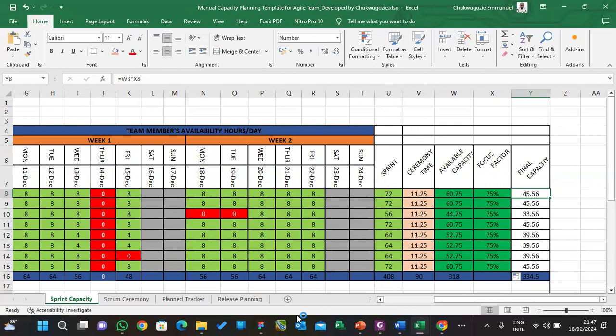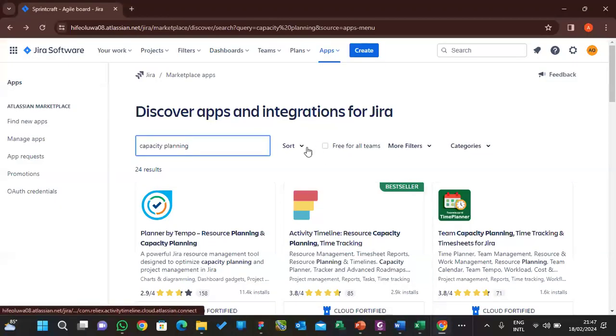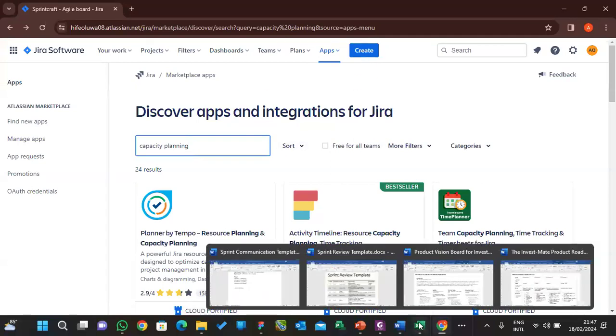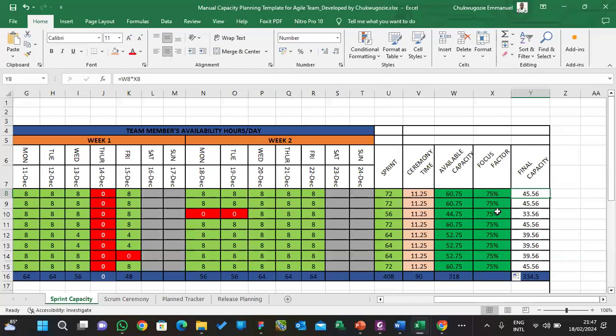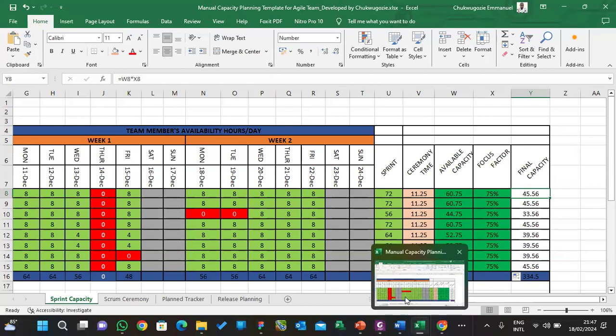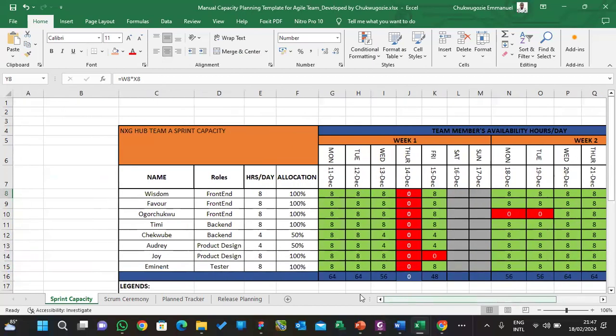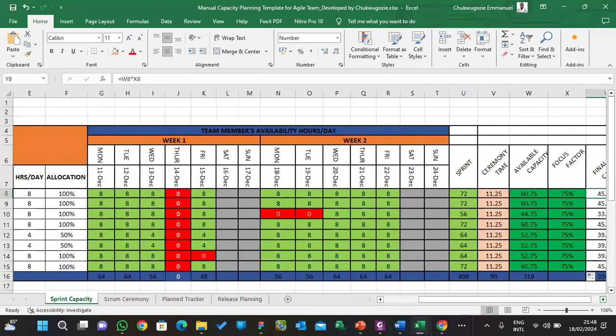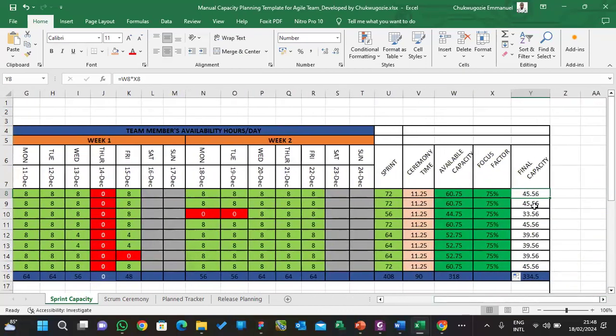That is why I told you now that story points is different from time estimation, right? So this is where you make use of time estimation. You use time estimation to track the workload of your team, of your developers, while story point is used for relative estimate of each of the user stories, right? These guys are breaking down tasks now. So when I go back to Jira, I will show you guys something.